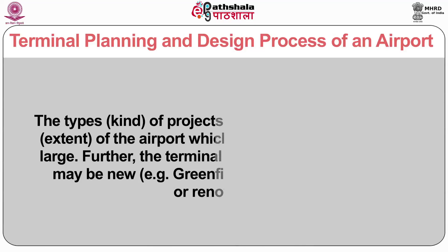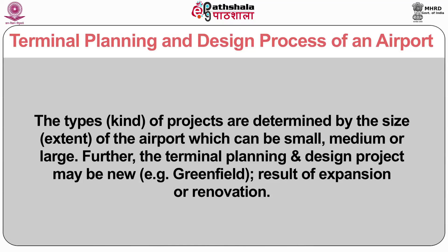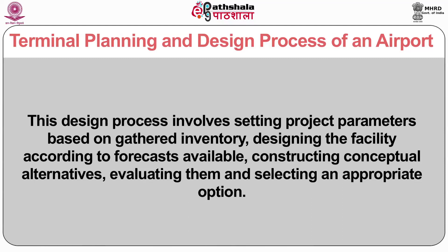The terminal facility planning is followed by the design project process which comprises the type of projects, type of services and identifying a preferred terminal facility solution. The types of projects are determined by the size or extent of airports which can be small, medium or large. Further, the terminal planning and design project may be new, or a result of expansion or renovation. This design process involves setting project parameters based on gathered inventory, designing the facility according to forecasts available, constructing conceptual alternatives, evaluating them and selecting an appropriate option.